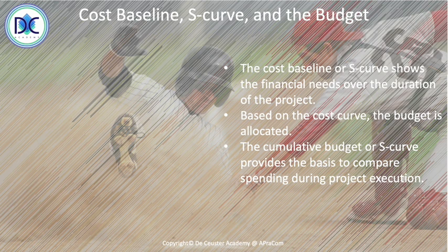Budget allocation is important to project progress. If we have a budget, if we still have money available, we can work on the project and the activities. Once the budget for that planning period has been exhausted, we must stop the work, and it can happen in some cases, and it can be very frustrating even when you see that you could finish something quickly, or the customer may wonder why you stopped working on the project.